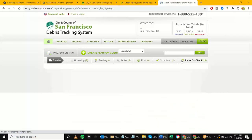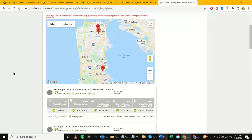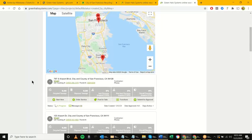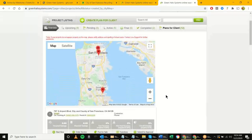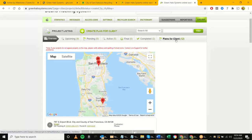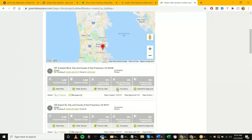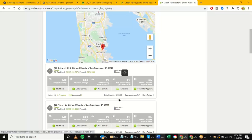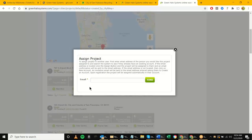At this point we are now assigning the project. You don't have to do this right away — it could be saved for a week or a month — but once you identify who the contractor is going to be, such as Pankow, Skanska, or whoever, notice the contractor info is currently blank. The goal is to go back into 'Plans for Client,' identify your project, and do Functions > Assign Project.